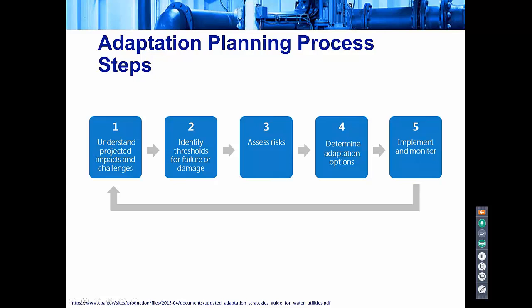And then you want to do some sort of cataloging of threshold conditions. A threshold condition is basically defining a level of a set of environmental conditions that when that level is exceeded, it's going to cause damage or failure to your operation or equipment, right? So how many customers do you need on your utility in order for you to bring in the sort of income that you need to do your job, right? What is the threshold for population? What's the threshold for heat? At what point is it too hot and you need to think about new strategies for dealing with your utilities, structures, and maintenance?